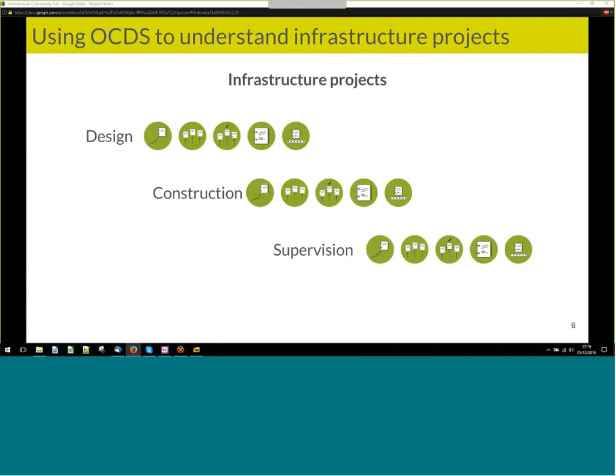At the moment, we use the supervision section not for the maintenance, but only for the construction. So when the construction is finished and the supervising engineer is confirming that and the payment is done and everything is clear, then this is the final stage of the contract. Further maintenance is usually a separate contract which can be awarded to a different contractor and may or may not be connected to the contractor who was involved in the construction. So I think in the future we see maintenance as a separate contract in a special section, maintenance, because it has a little bit different approach. It has no design, but it has maintenance.